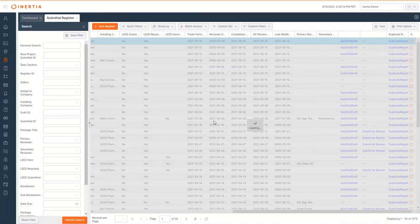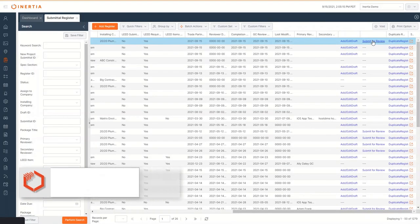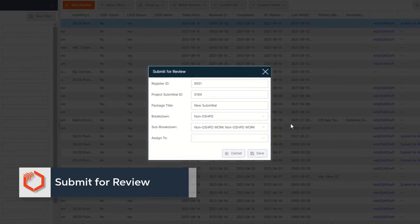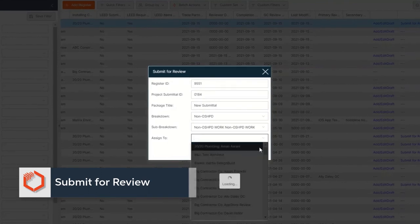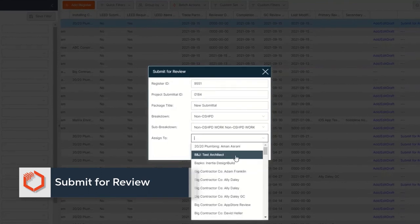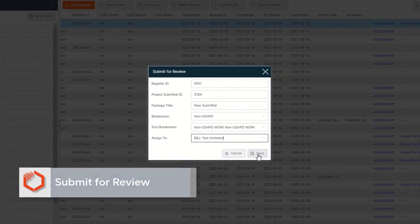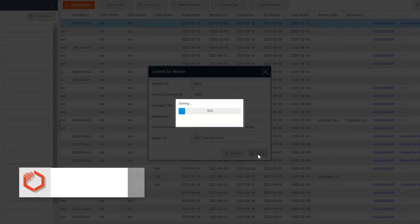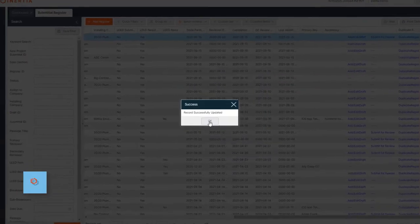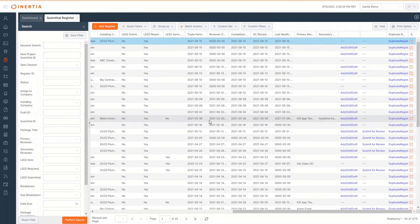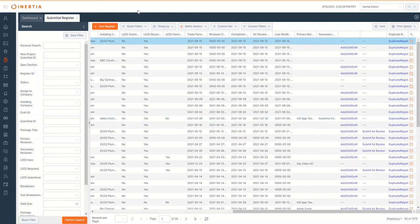Once you have reviewed and saved the information from the submittal register, it is ready to submit to the design team for review. Click submit for review and assign it to the appropriate party. After you click Save, they will be able to workflow the record and approve or reject the submittal accordingly.